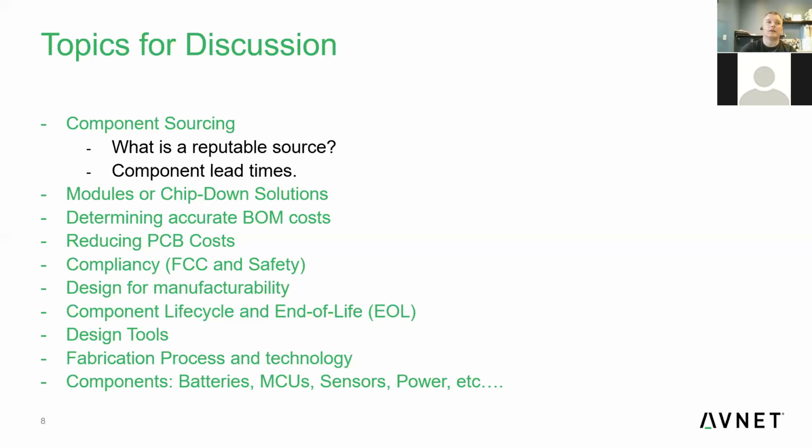It's one thing you've got to be aware of: even though you've completed design on a product, there's also what we call sustaining. Part of that sustaining is dealing with what we call obsolescence issues or component life cycle issues. Throughout the product's life, you're going to continuously be updating the hardware design. That's just one of the things you're going to have to live with, and it should be built into your business models, because this is going to happen.